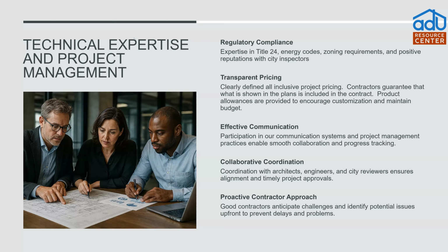You get to customize your ADU because even though you have an allowance, a certain amount of money set aside for maybe your tile work in your bathroom, you might go to Floor and Decor, you might go to Bedrosian's Tile, and you might find some absolutely beautiful tile and decide that you want to put that in your ADU. The way that all of the ADU Resource Center bids are going to work is it's going to be allowance based. You'll get, say, $3 a square foot for tile as a standard, but you're more than welcome to go shop for it.